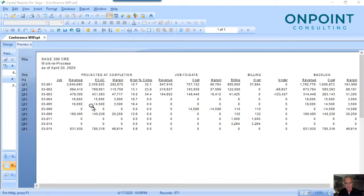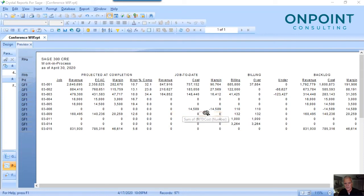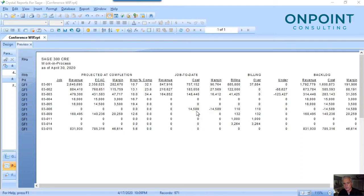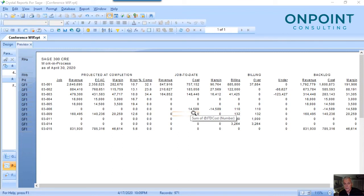I've got a couple of jobs here that clearly haven't started — their backlog is there. I've got a job that has incurred costs but we don't have the things set up yet. So the main question is: do we have a firm contract? Why are we spending money? Is this maybe a warranty on a closed job, or are we incurring costs on a job we don't have set up yet? We could be recognizing revenue on the financial statements — and that's going to be important when the banks start looking at our financials, if they're not already.